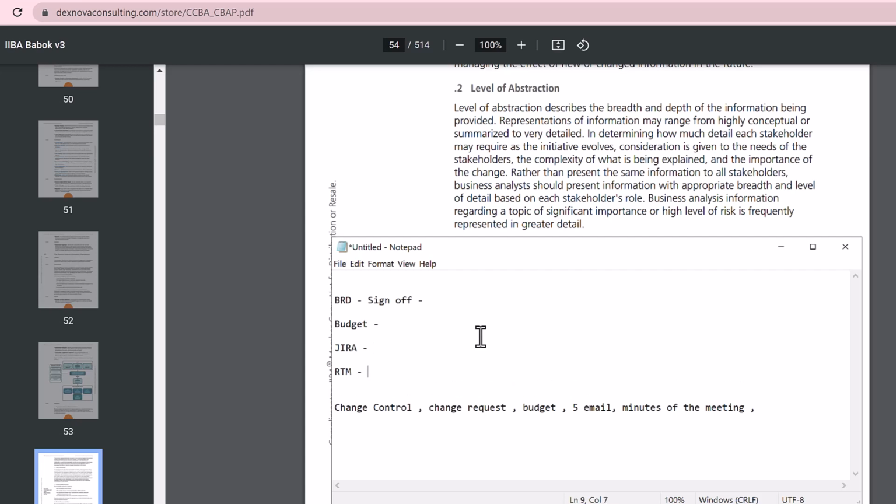So we used to have an Excel sheet, and we would write all the requirements and trace every requirement manually: who's responsible for those requirements, whether it's completed, in progress, or done. So we would do it manually. But after we have products like Jira or other requirement tracing tools available, now it's much easier, because once you create stories, they're in the backlog and can be traced.